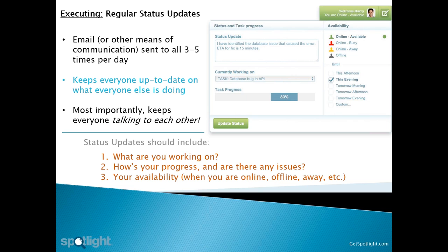It's designed to get your entire team together, especially a distributed team, at the beginning of the day, and let everybody in turn describe what they did yesterday, what they're going to do today, and any issues or blockers that they might have. Now, this daily meeting, this daily scrum, has several key advantages.